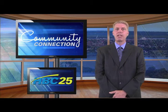Ward stated that eminent domain proceedings have begun against remaining property owners, but that private negotiations are continuing with those parties. For bridge construction to remain on schedule, the remaining properties must be in MnDOT's possession by January 2015.